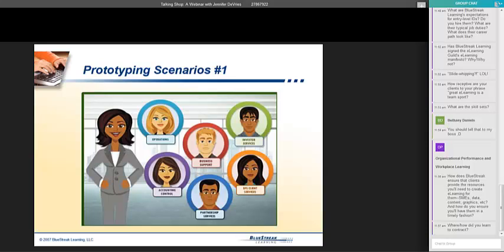Same thing, you're going to have to review your design document. It's going to take you 2 hours to review your design document. We're going to have a kickoff call. You're going to have to be there for an hour. You're going to have to review your storyboards. It's probably going to take you 4 hours to do a detailed review of each one of these storyboards, or whatever it is. It's in the contract.